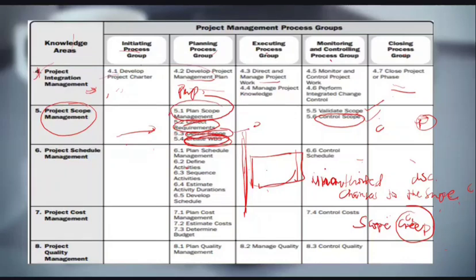But let's assume mom says, yes, now we've made some arrangement. We've made some changes. We want to invite all students to the party. It'd be nice to have all students coming to the party. So I want to give the go ahead. It's been approved. Project manager is aware. Then project manager will give that instruction. Okay, so go ahead and invite all students. We'll now go and redefine the scope and add inviting all students to the scope of work that we have to do. I hope it makes sense. I'm trying to make it quite practical for us to understand it. Then that is added. If not, it will constitute scope creep.